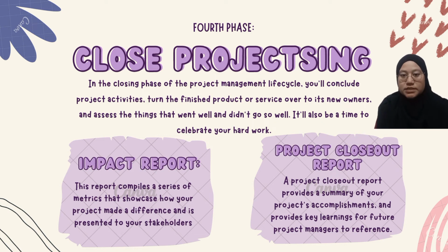This report compiles a series of metrics that showcase how your project made a difference and is presented to your stakeholders. Then the next one is the project closeout report. A project closeout report provides a summary of your project accomplishments and provides key learnings for future project managers to reference.